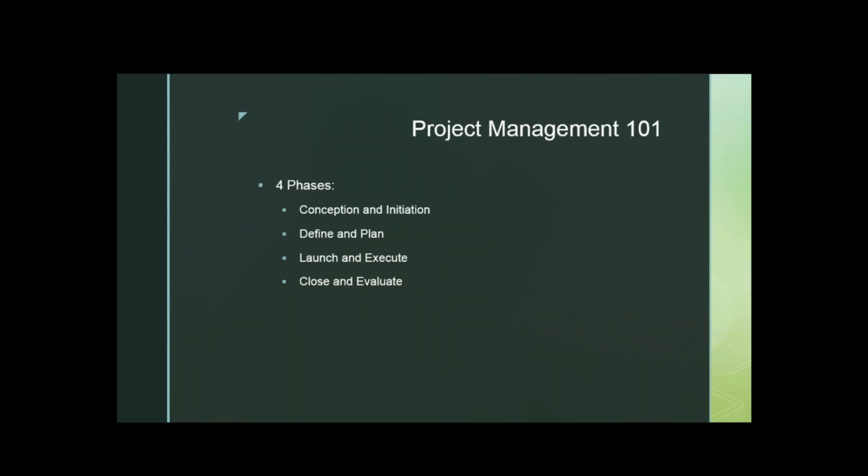The other thing to keep in mind, and I know I've been in projects where we never thought about this, is a handoff process. So now that you've done this project, because we know it's just a short-term start and end thing, is someone going to be responsible for this going forward? Because maybe you've developed some nice little program and you've built up an audience and there's a lot of interest, and now your pilot has stopped. Well, what are you going to do? Are you just going to drop everything and abandon your audience, or do you have a plan of how you're going to sustain this if it's successful? So you want to keep that in mind in your closing and evaluation plan.